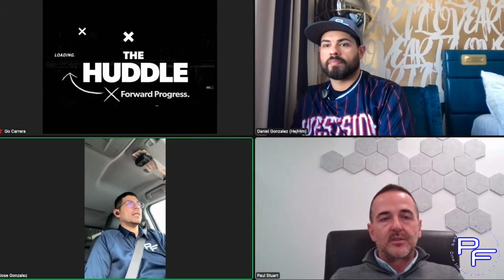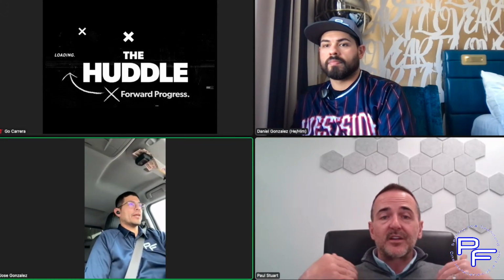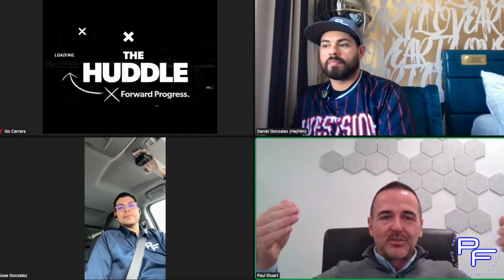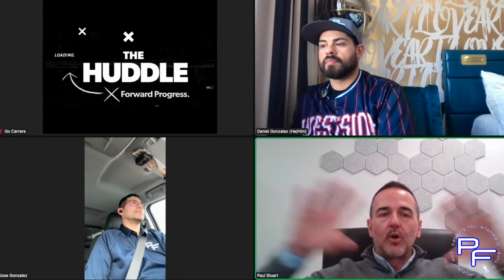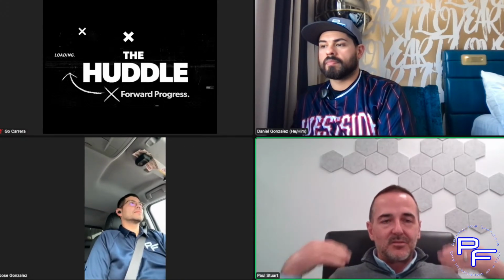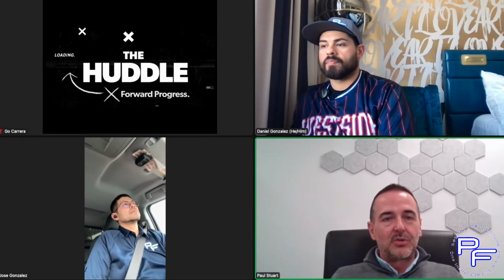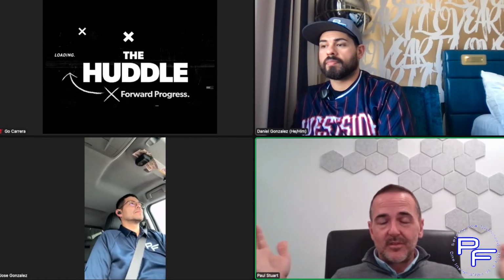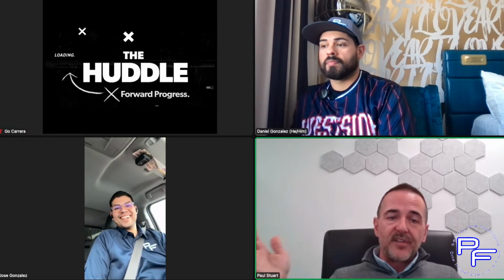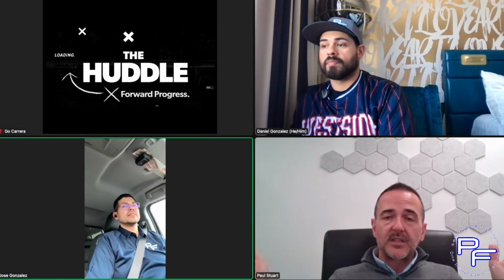So I like that. I don't send out an RFI because I don't want them to go to an RFI, send it out for all bidders to find what I found, and use that.